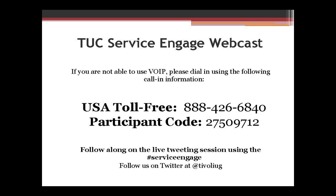When we take that thing from the top of the list, as a team, everyone gets together and breaks down that story into smaller chunks. It could have 2 chunks, it could have 7 chunks, it doesn't really matter. We write them on these giant Post-it note stickies. It's actually really awesome. Bill gets excited when he hears the sound of one sticky moving. It's kind of funny. We put them on stickies, and a Kanban board is basically, go Google it later, a couple different states, and you move one thing from one section to another, and you can only have one thing in one section at a time.